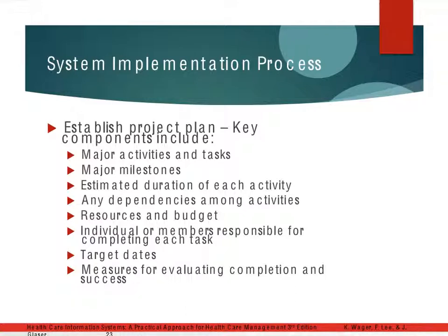An example I can give you is if the inpatient area goes live, yet the outpatient clinic has maybe a year and a half or 2-year lag time, there's a lot of dependence there. When patients are seen in outpatient follow-up by the clinical specialists, and those outpatient areas don't have access to the electronic health record, or people haven't been trained to use it, it causes great challenges. You need to look at resources and budget, the roles of the members of the team, target dates, and everything that you do.